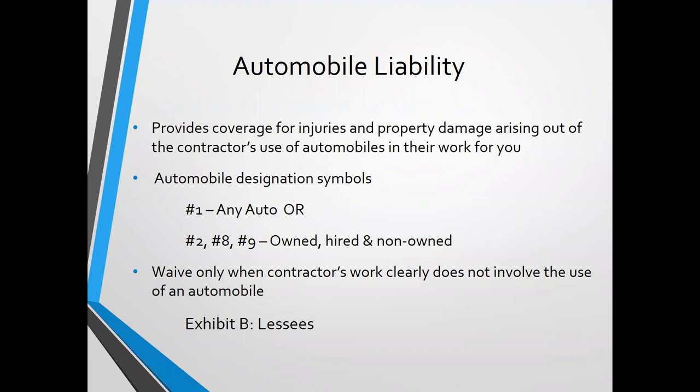There are examples where automobile liability may not be necessary. One scenario would be lessees — if a third party is leasing office space and not providing livery or delivery services, and it's simply a standard corporate office where employees drive personal automobiles and park in a lot, then automobile liability probably isn't necessary for that agreement.